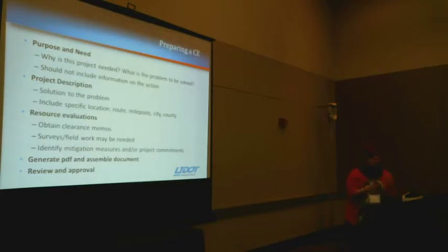So at the end, and I'll show you this, once you've finished everything in EPM, there's an option to print, which essentially generates a PDF. You assemble everything, you save it as a PDF, as a nice clean document, and it should all be one document, not the PDF form and then separate PDFs for all of your other resource memos. It should be one PDF document. And that'll get reviewed and approved and then entered and saved in ProjectWise.